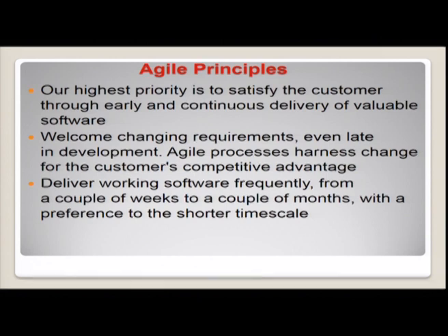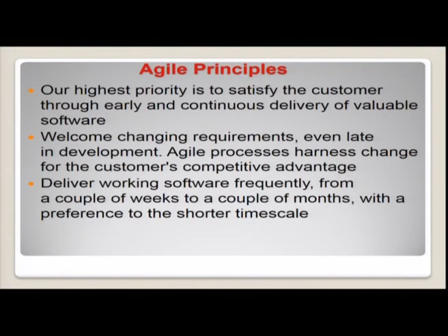Again, my dear students, when you look at the Scrum framework, there they work with a technique called a sprint. A sprint is an iterative process wherein the duration of a sprint will be 15 days to 30 days. So every 15 days you are supposed to show working software to the client, to the customer. So this third point denotes: deliver working software frequently, from a couple of weeks to a couple of months.